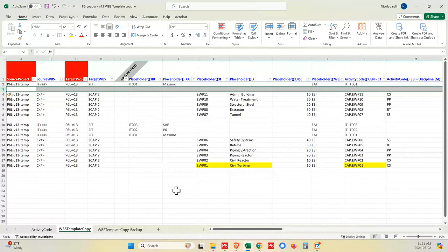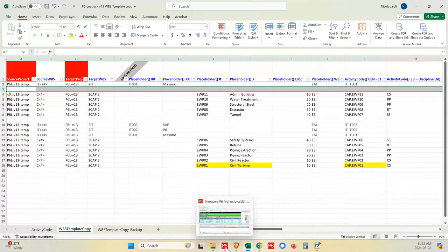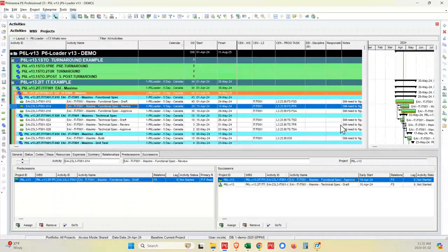Now then you still might have to do inter-package logic and things like that, but the guts of it are there. The framework is there. So it's a huge, huge, huge time saver. We would have needed at least 6 schedulers to do the work that we were doing with a team of really 2 full-time people working on it. Okay, so hopefully I gave you an idea of that. So this was one of the very big enhancements that we did.